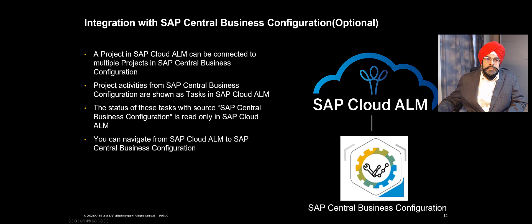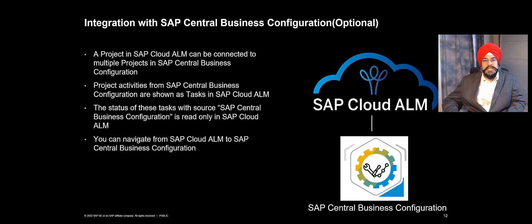Then we come to the optional step of integration with SAP Central Business Configuration. If you have enabled this configuration, the dropdown for integration scenario will be enabled and you can select an integration scenario. What you can do after this integration is set up is connect multiple projects in SAP Central Business Configuration to a single project in SAP Cloud ALM. That way the project activities coming from SAP Central Business Configuration are replicated into SAP Cloud ALM as tasks with a dedicated source. Those tasks are set to read-only in SAP Cloud ALM because the status of those project activities can only be changed on the SAP Central Business Configuration side.